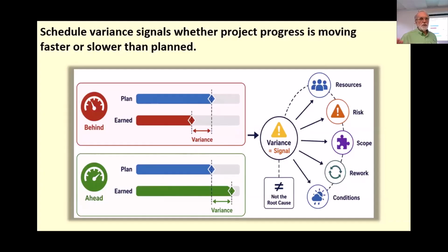Rework and all these things we just talked about here, the resource shortages, all those problems work like that feedback. In other words, once they occur, that has to come back into the planning process somehow and back through our project management processes. And what that does along the way is consume resources. And eventually you get to a point where you're just stalled. The project can't move because we've got so much of this rework going through the system, this replanning, this recycling. And every time something like that recycles, it's going to steal resources.